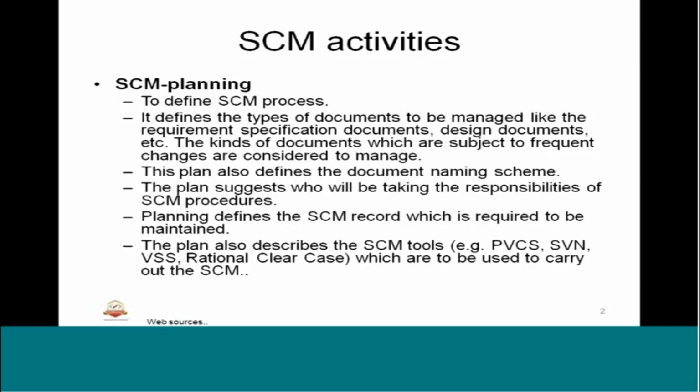So SCM plan is a document basically which serves as a reference for the SCM process. It defines the types of documents to be managed, like the requirement specification documents, design documents, etc. The kinds of documents which are subject to frequent changes are considered to get managed. This plan also defines the document naming scheme based on the customer suggestion or any consensus that are happening within the configuration item. The plan suggests who will be taking the responsibilities of SCM procedures.